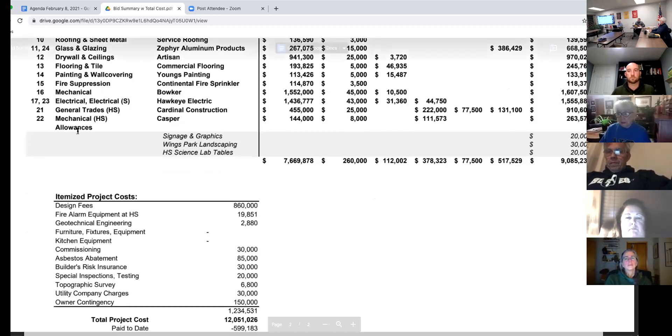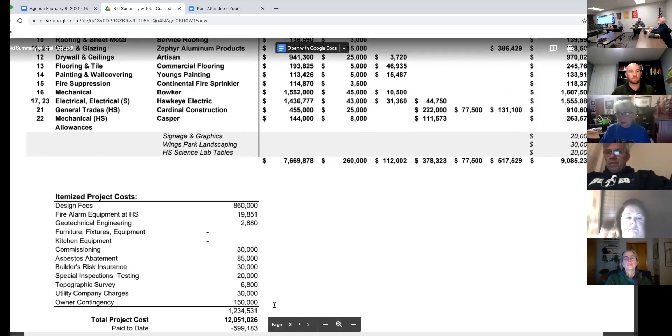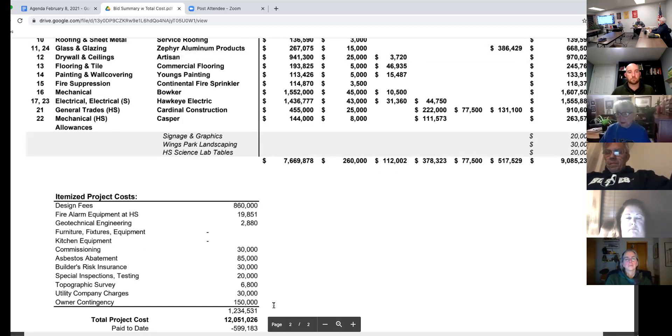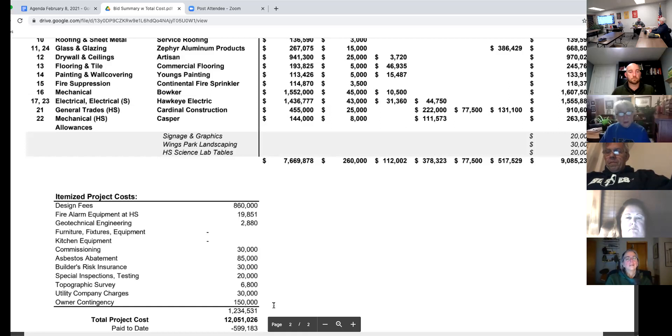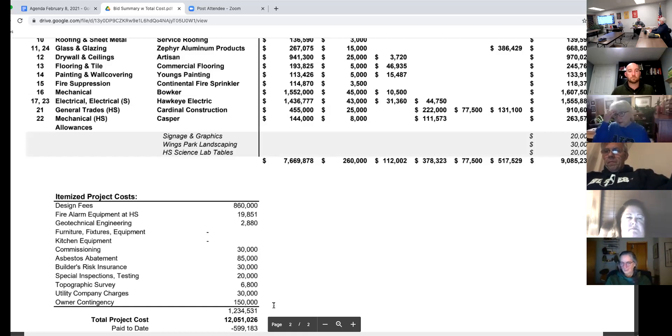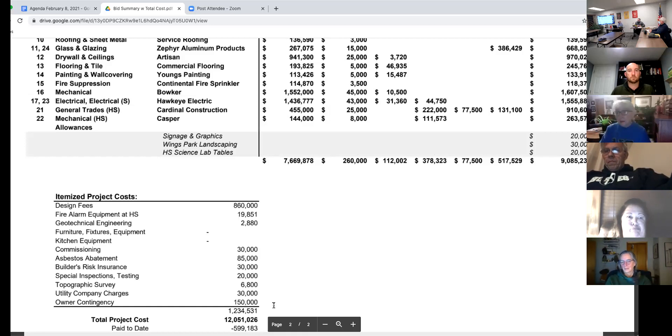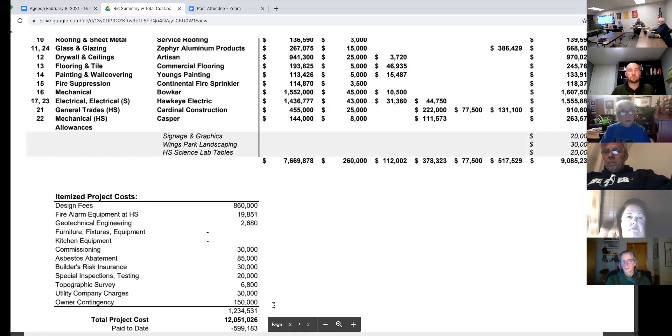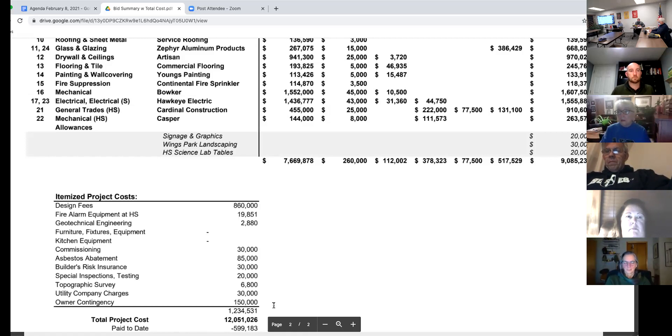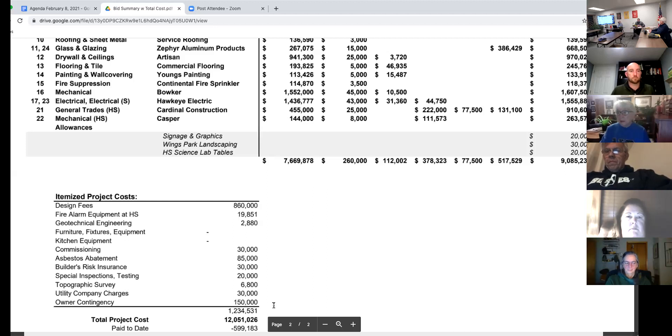And then the same thing down here for owner contingency, that $150,000. That is for what I would maybe consider scope creep, where we get into some areas and we're like, oh, well, we're here. We can take advantage of this opportunity. While the contractors are here, we ask them to do something outside of the contract. And those are driven pretty much by me, Kevin, and then the board, if we want to go outside and do something different. And those things do come up from time to time. As you dig into the project, there are opportunities, and we just have to evaluate them on their own merits. But we do budget for it so that we understand where those dollars could potentially come from.